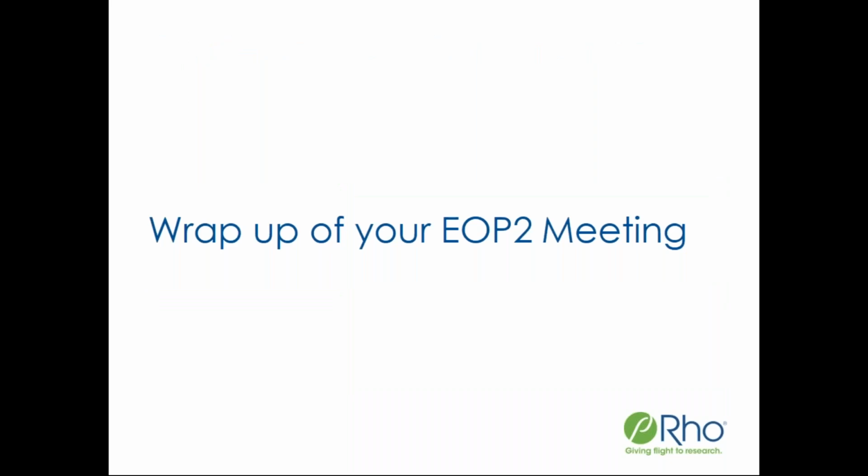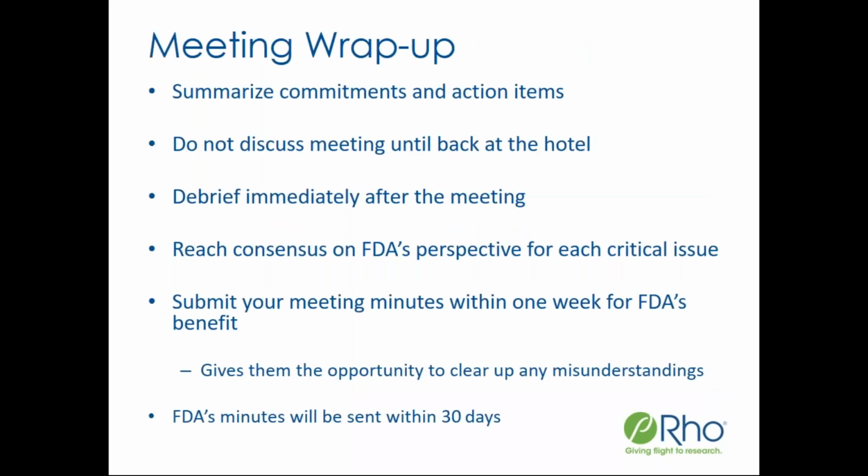So the wrap up of your end of phase 2 meeting is essentially ensuring that you summarize all the commitments and action items, and this starts right at the end of the meeting. Your moderator should take careful attention to all the things that you said you were going to do and itemize them out so that both the consumer safety officer or the regulatory project manager at FDA can get them down, as well as your company's team. Do not discuss the meeting until you are back at the hotel.